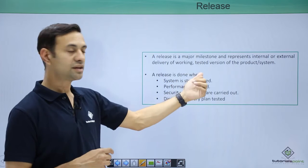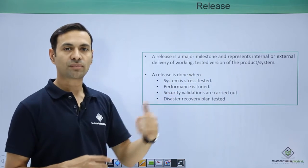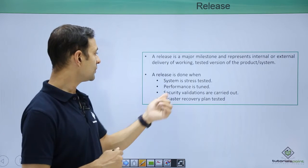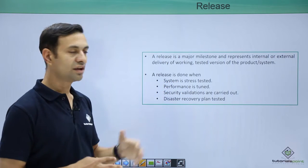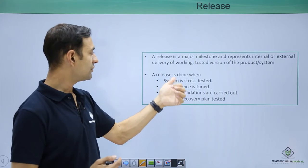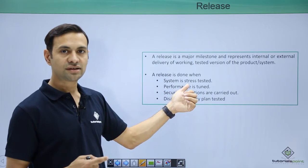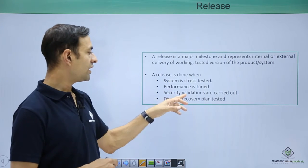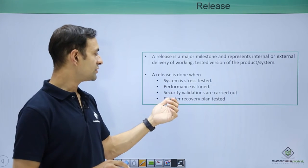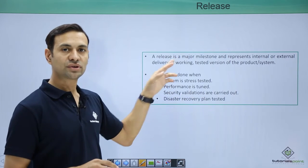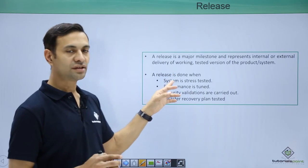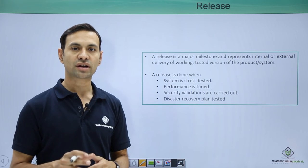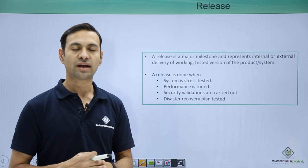A release is a set of iterations, just as an iteration is a set of user stories. Release is a major milestone — it represents internal or external delivery of a working, testable version of the product that a client will use directly in production. Release is done when the system is stress tested to handle multiple users, performance is tuned, security validations are carried out, and the disaster recovery plan is tested. Once this is done, we can tell the client the product is ready to deploy in production.